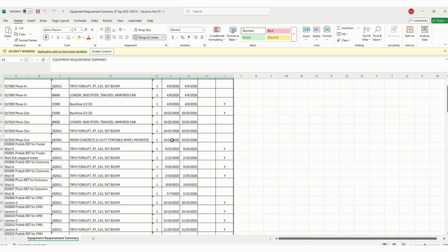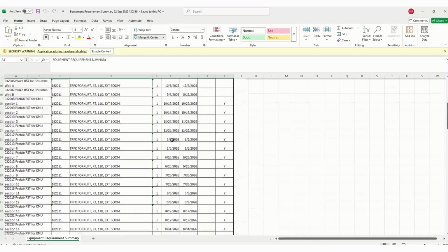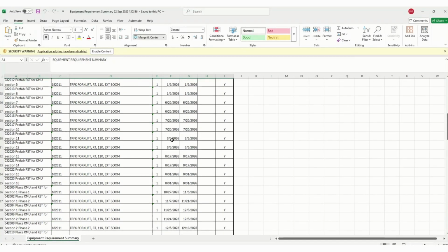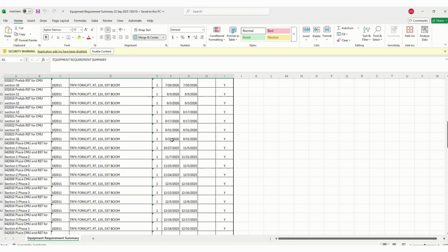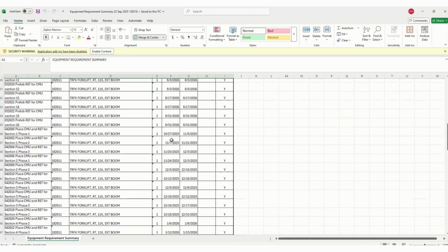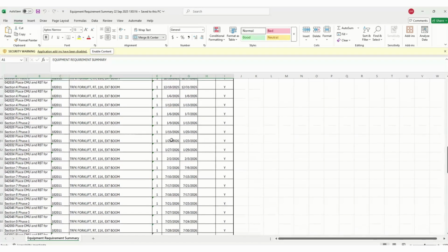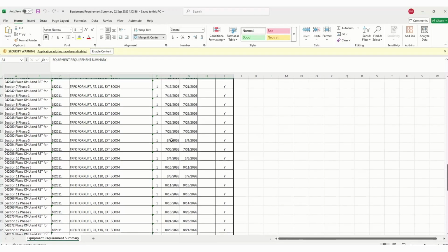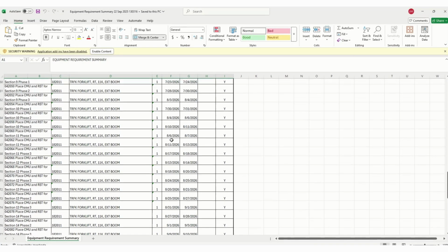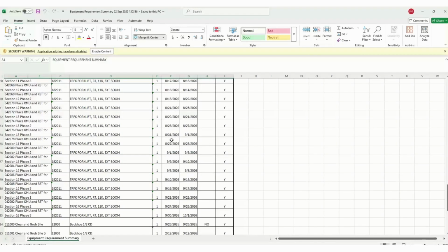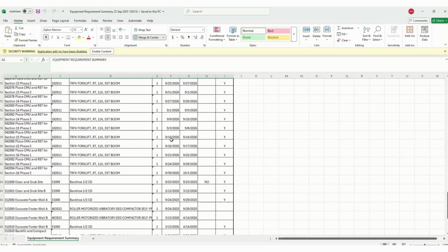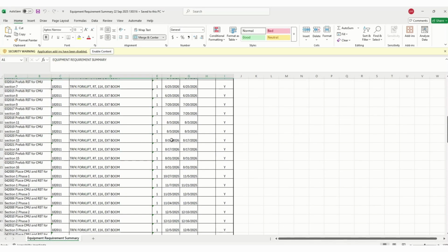This helps your transportation department know when you're going to need what equipment, so hopefully they can help push back the 3M maintenance requirement for that, or get it done before you need it. This way they're not having to take it off site while you're using it and change it out with another piece of equipment. Okay, so that's your equipment list.